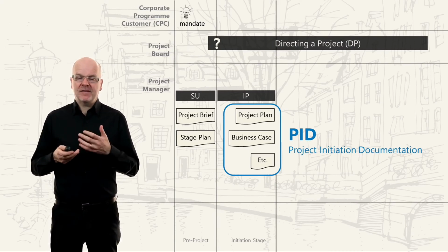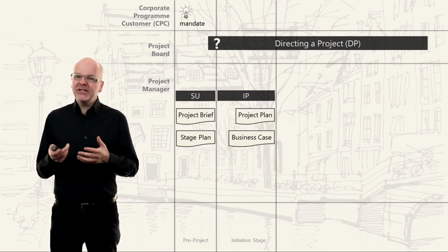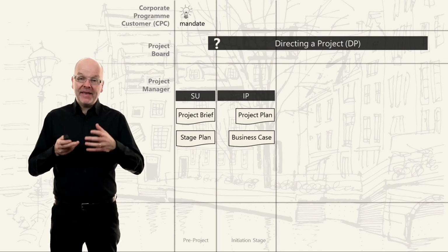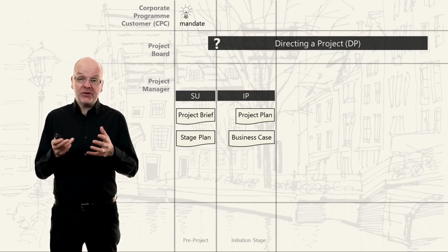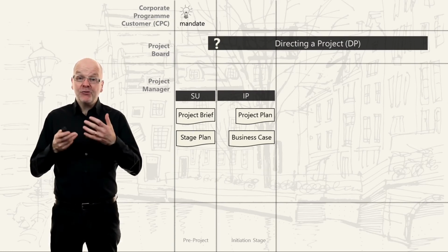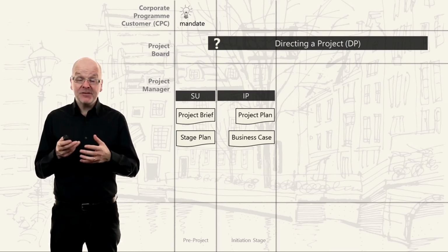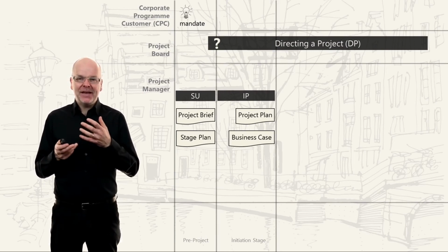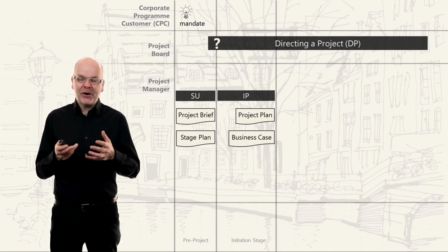Next to discuss is the benefits. The project manager here will ask the following question to the senior user: what are the expected benefits of this project over the next years? And then the project manager should write these down, as it helps to hold the senior user accountable. Otherwise, they may over-exaggerate to help to make sure that their project is prioritized over others.